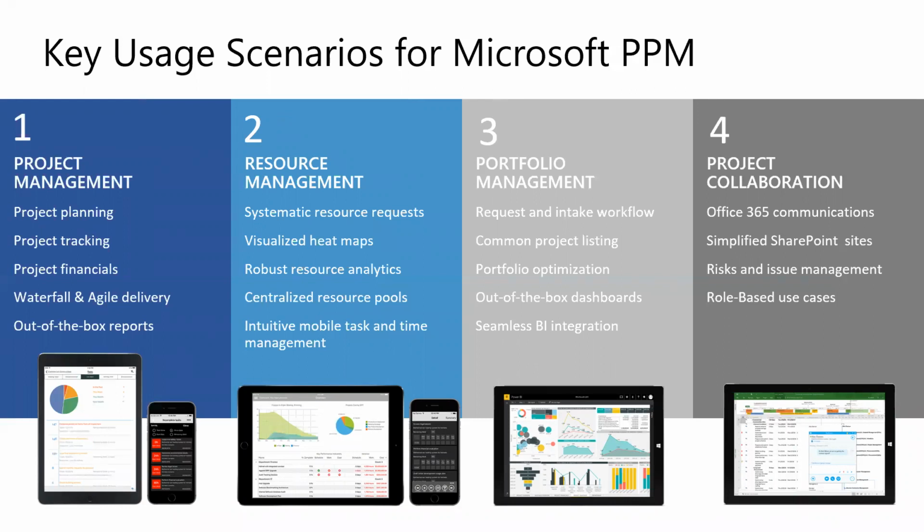A third usage scenario is overall portfolio management. And this kind of walks you through the process of selecting your projects. You know, you'll determine, and all of this is out-of-the-box features within the tool, you determine what your strategic goals and drivers are, your business drivers. And then it allows you to use that information to do some prioritization and selection. So you have all these ideas for projects, and now you have the ability to rank those projects and even determine which selection of projects will give me the biggest bang for my buck.